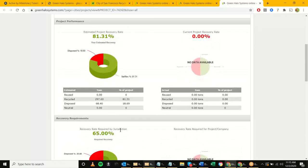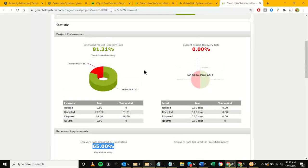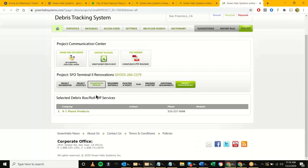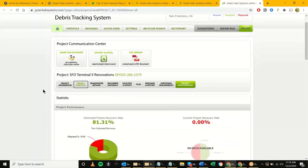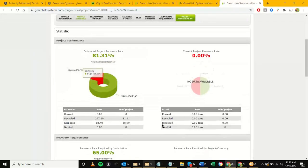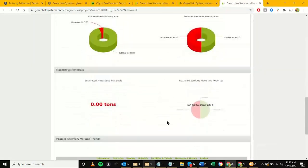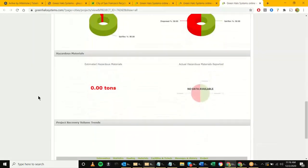The project stats focus on whether what they're estimating exceeds the requirement. Next, you can verify the transportation method — A1 Planet Products. James interjects: during review, note that when there are hazardous materials, there are times material has to go to landfill. Under the rules there is no direct haul to landfill of discards, but when it's appropriate — such as for asbestos-containing materials, lead-based materials, or contaminated soils — those materials will come with a manifest or abatement inspection.